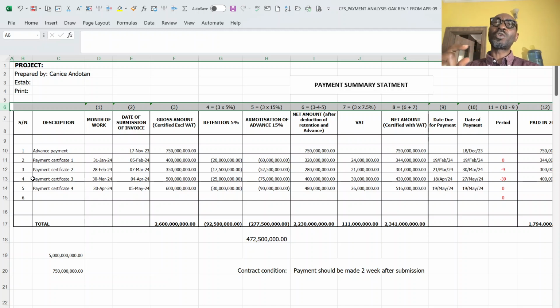That rate will be what you will add, whatever the clause, the condition has applied. Sometimes the condition will set 4%, 2%, 3%, 1% plus the NIBOR rate. Meaning, if on the CBN website, say it is 27%, it's 30%. It is now 30 plus the 2% that the contract has stipulated should be added to what is on the website of the Central Bank.